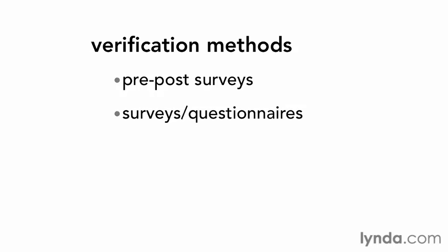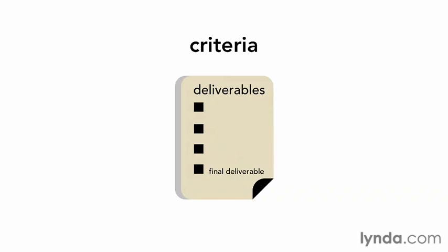Early in a project, you don't have to describe all the criteria for every deliverable. Start with the criteria for the final deliverable you give to the customer. That one is particularly important because it usually ties into getting sign-off that the project is complete, and it might trigger the final payment. You can swing back around to the deliverable spreadsheet as you define and plan the project, in the process identifying deliverables or uncovering more detail about how you'll evaluate them.